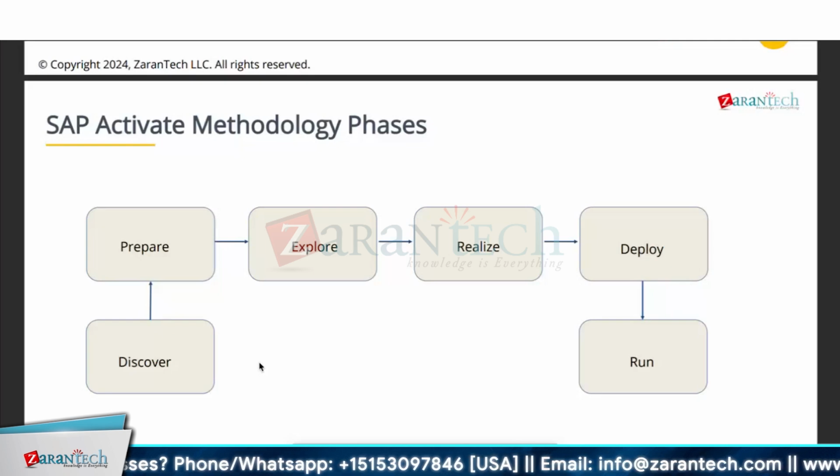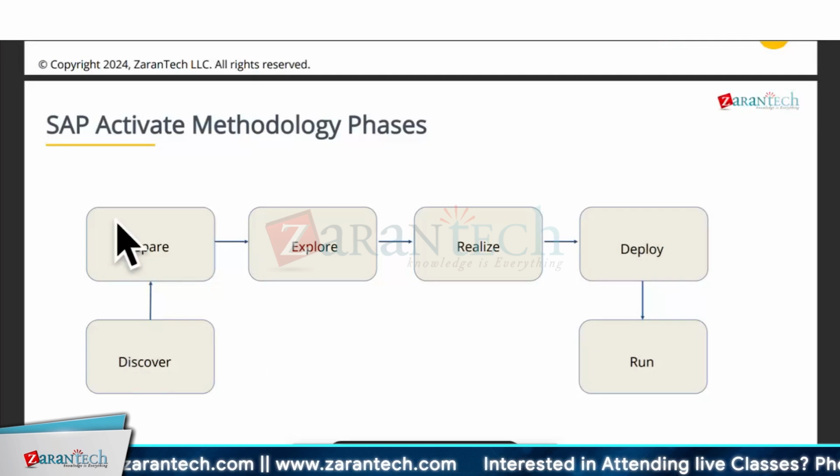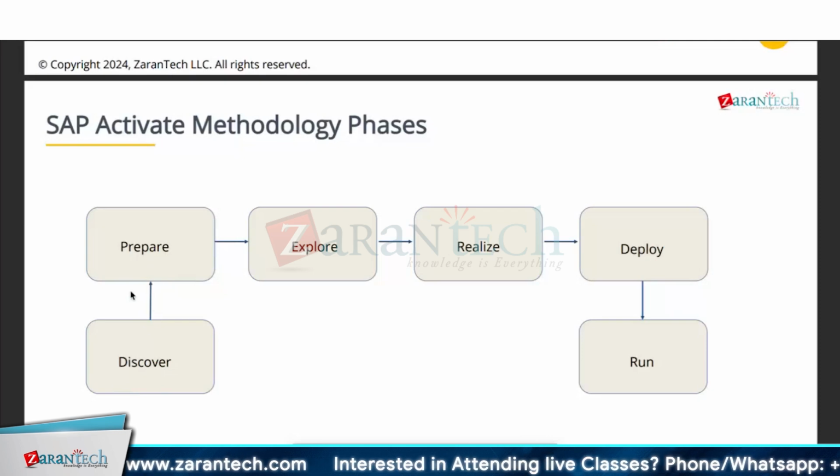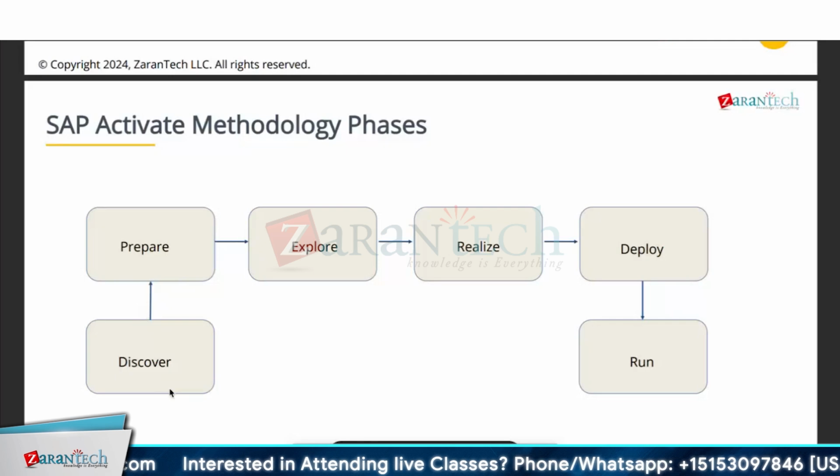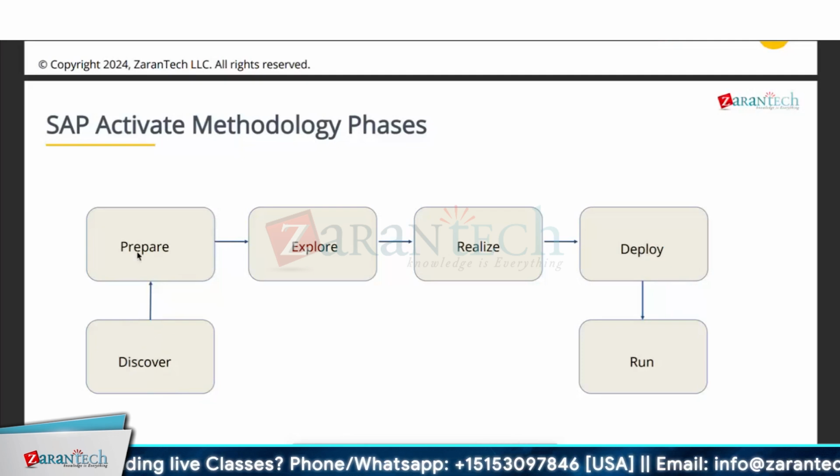especially finance, it's a structured approach we have. Okay. In the project planning, we will be defining the scope, the timelines, deliverables, like every time we do. And here we will identify the key stakeholders and we will start establishing the communication channels also at this phase. Okay. And at this level only, we will set up the project governance structure, because we have to ensure effective decision making. So who will be the decision makers and who will provide the data for the decisions, and who is the operational team who can help on that, all these things we will do at this level, which is the project planning and scoping level.